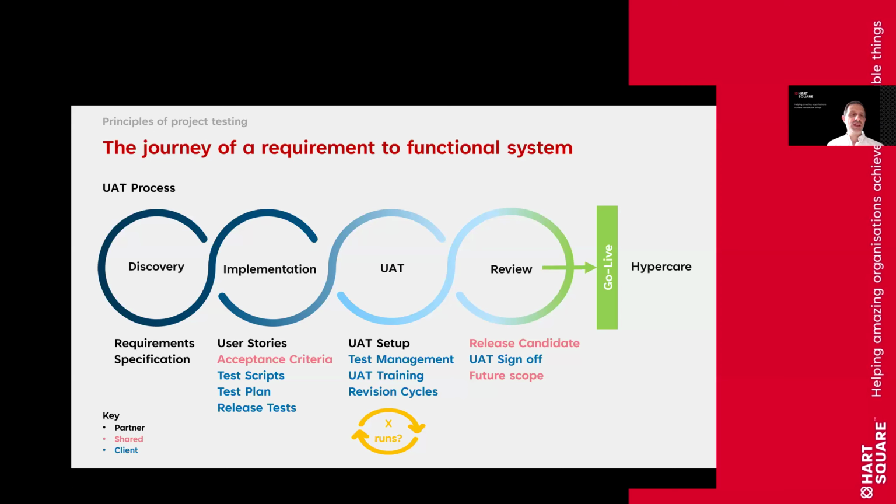And I have seen far too many times that there is an expectation that there will be more runs. Each UAT run or each UAT cycle does require effort from both parties, and so that can change the costs and efforts required from your technology partner. So really key point, do ask that question early up front so that you can understand what their role will be in UAT and how many times you will run UAT until you achieve success.